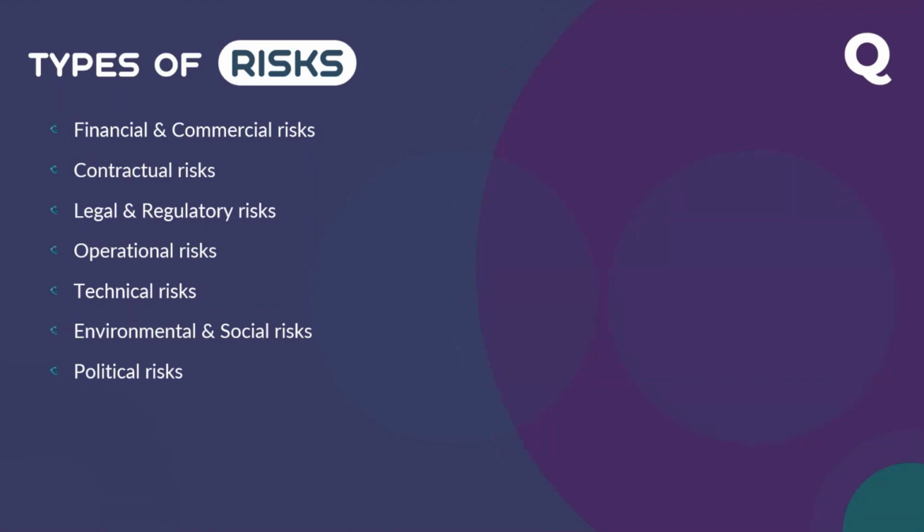The client should ensure that the asbestos is removed safely as per the environmental protocol, and that shouldn't impact your project. Basically, your part as a contractor is that if there is an environmental or social risk, it should be addressed by the client, because the client is the best party to do that. You as a poor contractor came to do the work, not to spend your time and money on this social environmental risk.